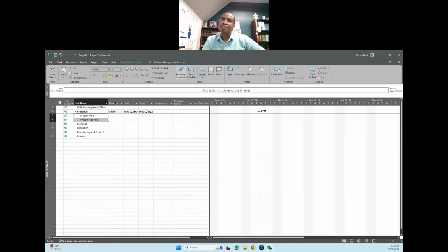You see, I have the project duration, I have the start date, I have the finish date, and then on the Gantt chart, something also has happened. There is this date which has just popped up, February 28th. So there is this diamond box showing a milestone. So initiation has already become a milestone because already we have project idea and project approval.